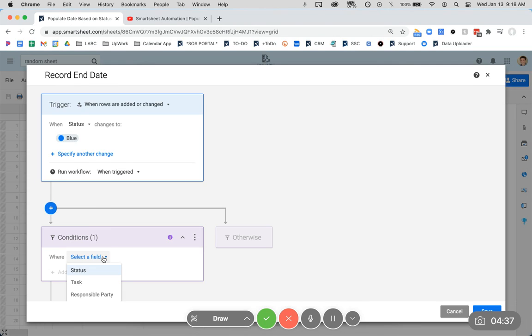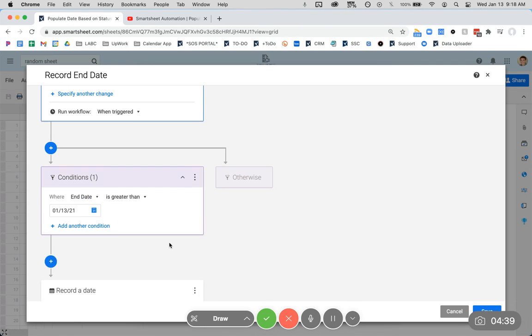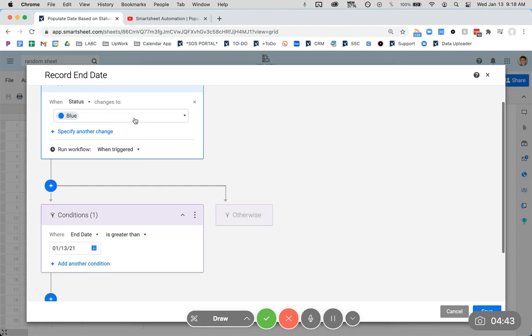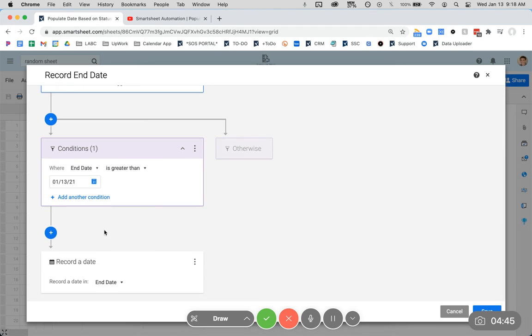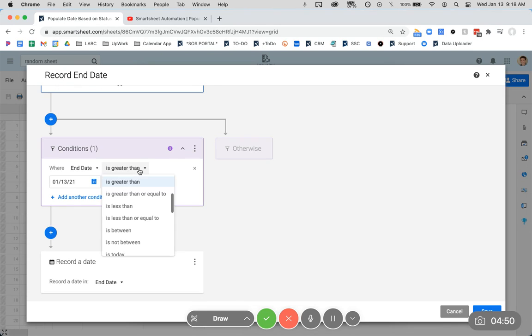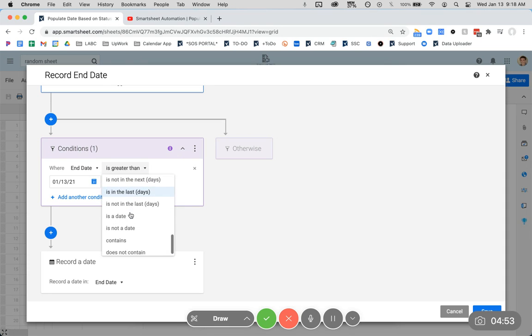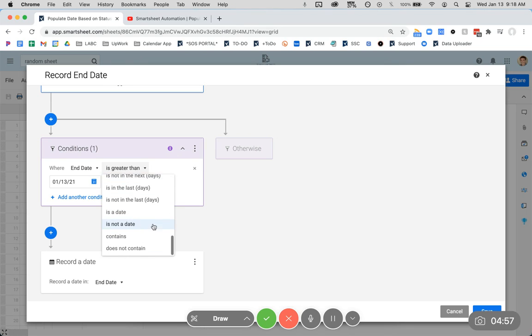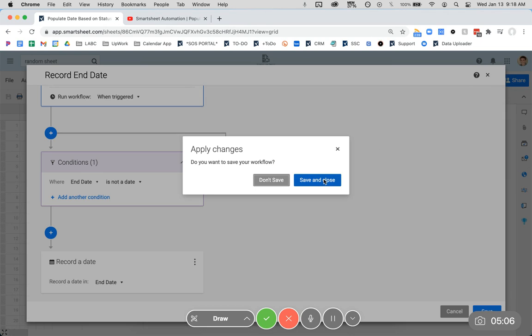So we're going to need to put a filter in place. Basically what we're going to do is tell the system when the status has changed to blue, only when there is no date in the end date column should you record it. So we're going to say end date is not a date. You could technically use is blank. I prefer to make any parameter associated with a column specific to that column type. We're using a date specific column. So I want to use this, is not a date.